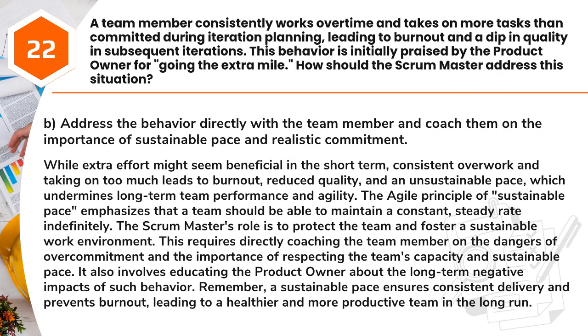Answer: B. Address the behavior directly with the team member and coach them on the importance of sustainable pace and realistic commitment. While extra effort might seem beneficial in the short term, consistent overwork and taking on too much leads to burnout, reduced quality, and an unsustainable pace, which undermines long-term team performance and agility. The Agile principle of sustainable pace emphasizes that a team should be able to maintain a constant, steady rate indefinitely.